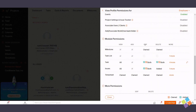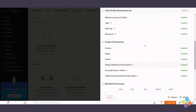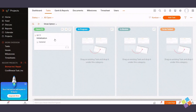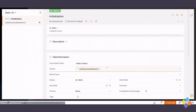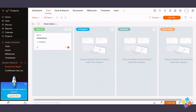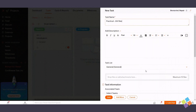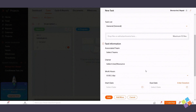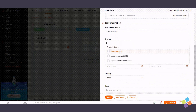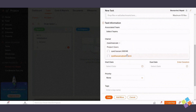Moving on to managers, who oversee specific aspects of a project. To set up a manager role, choose a specific task within a project and designate a user with manager-level access. Managers are often assigned to tasks or teams. You can create a task within a project by accessing it and clicking Add Task.